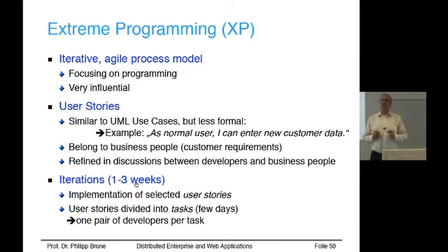In general, in all agile methods, you have the idea of a fixed time boxing. Everything is time boxed. You have a certain amount of time for something. For example, every iteration gets 3 weeks, 2 weeks, 1 week, depends. But you have to agree in the beginning. And that means that the customer can be sure that after 3 weeks he will see something. And the developers can be sure that after three weeks they will get feedback and they will get refinement on their user stories. So you have a fixed guarantee that something proceeds and you have progress that you can monitor and that you can control.